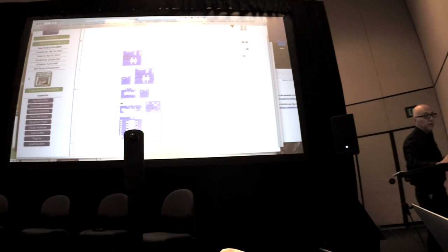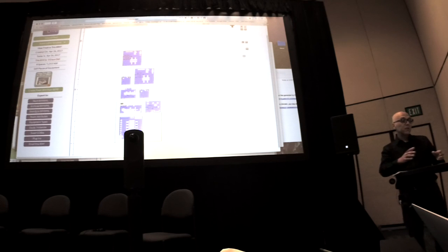I want a COBie file. Create a COBie file. This is a COBie file on day 0 of the project. The reason this is significant is this COBie has a structure of what they want, like that scheduler that Roger showed. These are the things that we call type A, B, C, D, whatever, and there's IDs associated with it. And you can take this out into SketchUp or ArchiCAD or Revit, whatever tools you want. And that is a starting point for the designer to then take off with this and start doing their work.